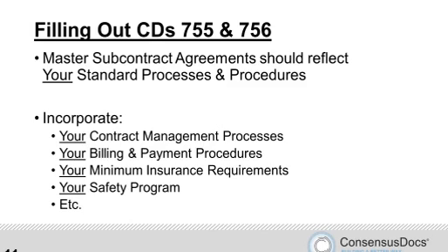But you need to make sure that when you're negotiating these contracts, you contain those provisions within the appropriate article. Don't negotiate language inside Article 3, the subcontractor's responsibilities, that should be contained in Article 8 for indemnity, insurance, and bonds. If changes are made in those sections and you're amenable to them, or you're willing to take some modification of those changes, make sure that it gets put in the correct section.